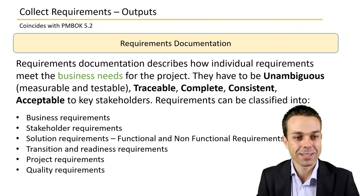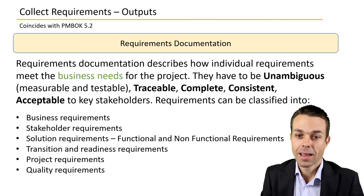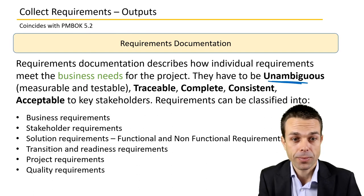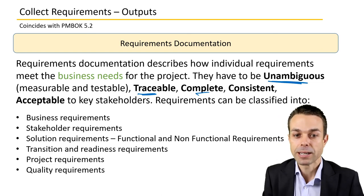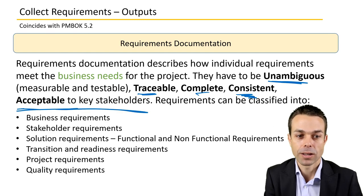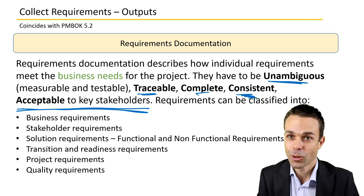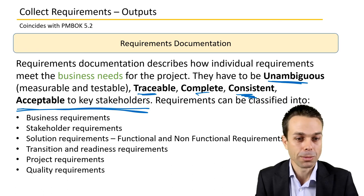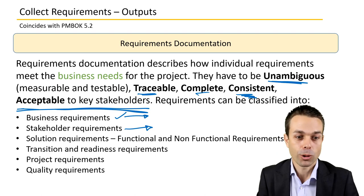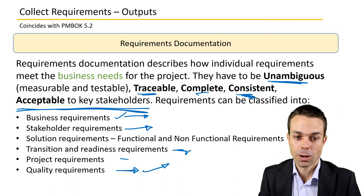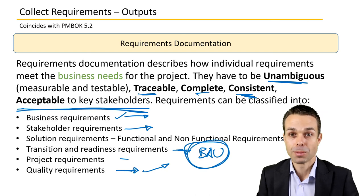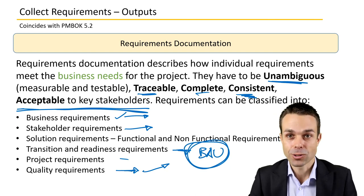Outputs include requirements documentation. Once gathered, requirements need to be unambiguous — very clear — traceable, so we know the requirement matches the deliverable, complete, consistent, and acceptable to the key stakeholders who need to sign off on them. These can include business requirements, stakeholder requirements, project requirements, quality requirements — does it have to be of a high grade or high quality — and any transition or readiness requirements for returning to business as usual, such as training or communications.